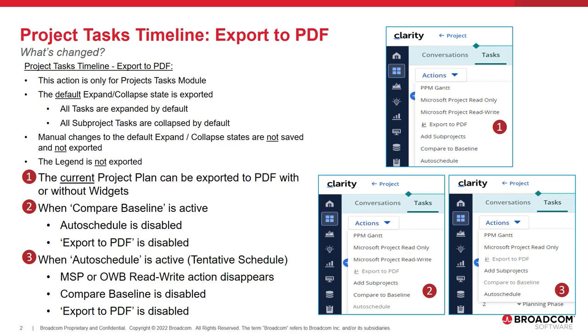When the Auto Schedule action is active for viewing a tentative schedule, the Read Write action of the scheduler for MSP or Open Workbench disappears and the Compare Baseline and Export to PDF actions are disabled.